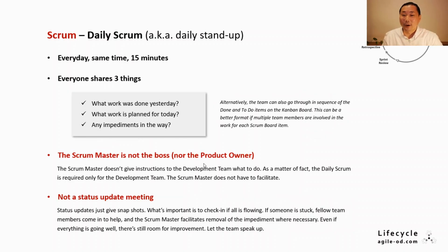Daily Scrum, more commonly known as the daily stand-up. This is a Scrum Guide required event and cannot be skipped. It is officially time-boxed to 15 minutes and needs to happen at the same time and place every day. To keep it from drifting, for example, persistently starting a few minutes late, I often suggest to the Scrum teams to set an odd time to start, like 8:43 a.m., finishing at 8:58 a.m. It registers on everyone's mind and keeps the team committed.